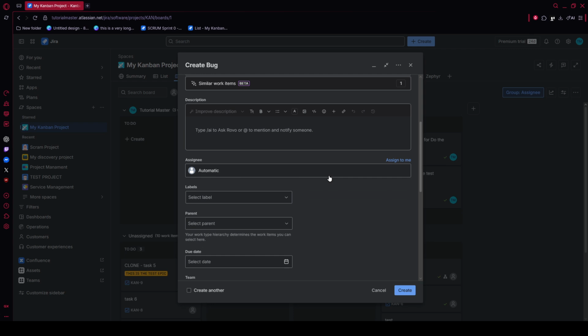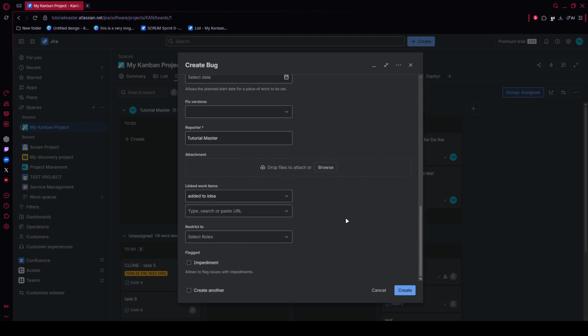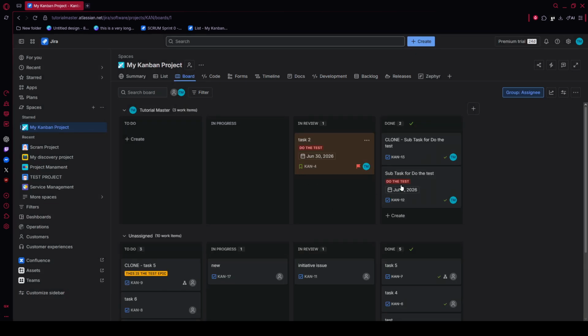After that, scroll to the priority field and choose the urgency level based on business impact, from low up to critical if needed. In many Jira environments, this also supports SLA tracking, which helps teams stay accountable and respond within the right timeframes. When everything looks good, click Create at the bottom of the window. Your new ticket will appear on the board.